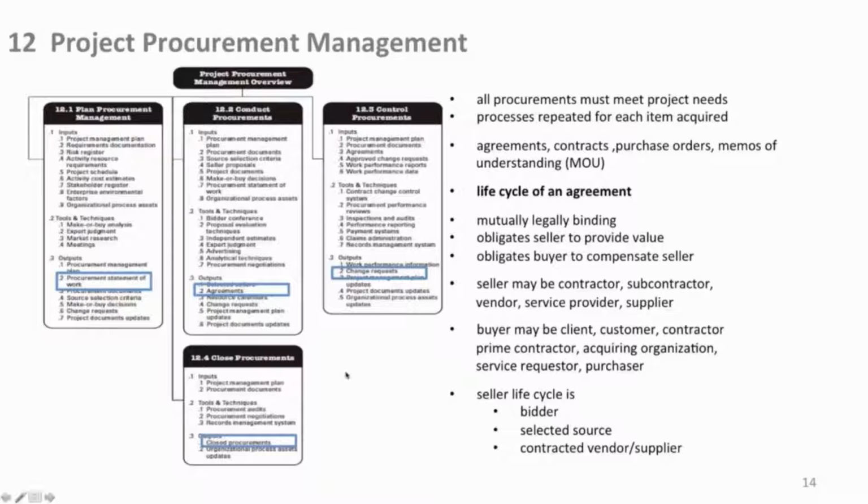And finally, when you're done, down here under closing, you close out each and every procurement cleanly. You cannot actually close out the entire project, which is the second of the two closing group processes, if you have open litigation in court. You really can't close a project. So you want to avoid litigation at all costs. You need to use your skills in negotiation and all that stuff to avoid that if there are conflicts or disagreements with your procurement documents. So we'll talk about that in more detail coming up.